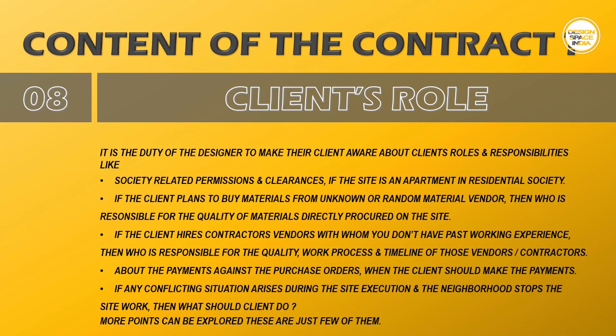If the client has hired any unknown vendors or contractors with whom the designer has not had working experience in the past, then the designer is not liable for the quality of materials, quality of work, or timeline of the project. 3. About the payments to be done to the vendors directly hired by the client, the designer has zero role in liability. The sole risk will be of the client.